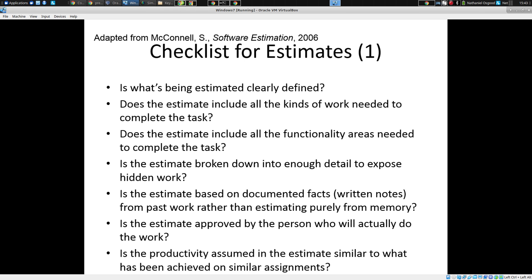And as Will said, that may get into issues of dependency, because they can't do that until they're done with this other task. Or they can't do it until this person is available to help them and that person's on vacation or on their honeymoon for the next 2 weeks. And it gets into very concrete scheduling issues, which we may have time to discuss in coming lectures.